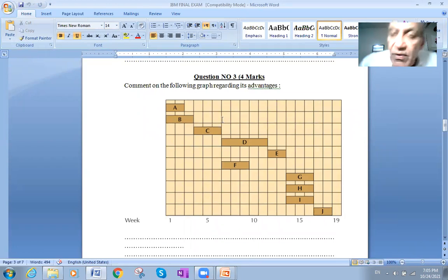It shows us the flow of each activity with the duration of time. It shows me, for example, that A and B can be done at the same time, but C has to wait until B is done. That means C depends on B. I cannot start phase D before phase C is finished. I cannot start phase E before phase D is done. But I can do two activities in phase D: activities G and F at the same time.